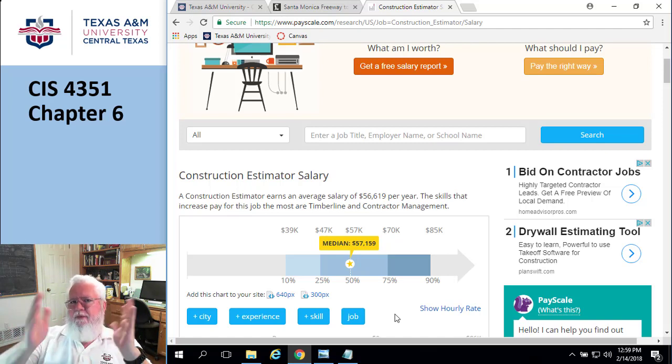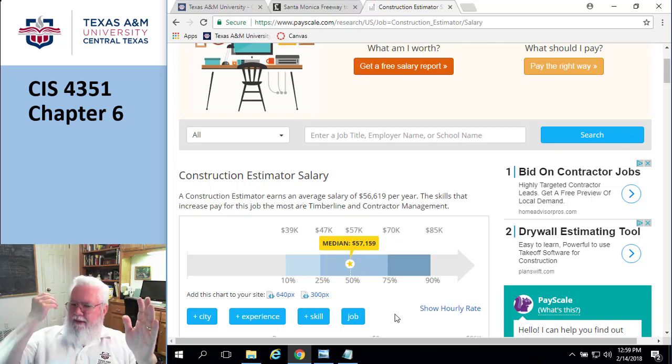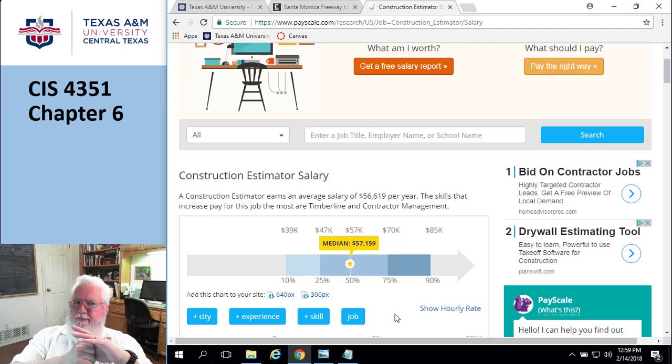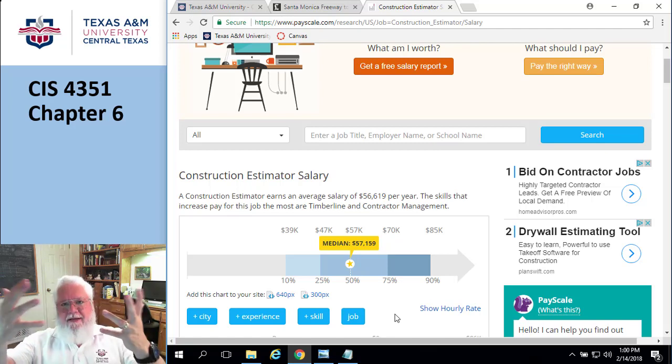I'm doing high voltage electrician. You don't just send a guy out to jump up on a pole and redo a transformer by himself. No, absolutely not. It's a minimum crew size of 2. I'm digging a ditch, and we're deep down. It's what's called a confined space, a trench, and I've got somebody doing a pipeline up to a house. No, I cannot have a guy in the hole without having a guy standing outside the hole. Minimum crew size of 2. So those kinds of things.